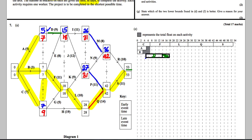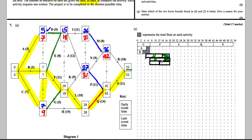For G: it starts at 7 and is 5 long going up to 12, but could go up to 18. Draw it out to 18 and colour in the float, labelling it G. For H: it starts at 7 and is 19 long going up to 26, but could go up to 28. Draw the slack out to 28, labelling it H.